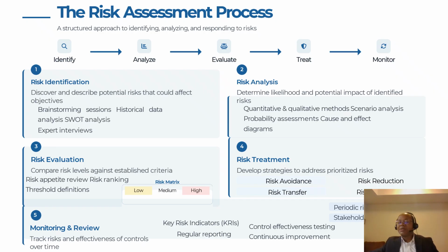Risk analysis, there are quantitative and qualitative methodologies that can be used to quantify or to estimate risk. Risk evaluation then is to compare risk levels against established criteria. Risk appetite review, ranking, and threshold definition are very important concepts in evaluating your risk.